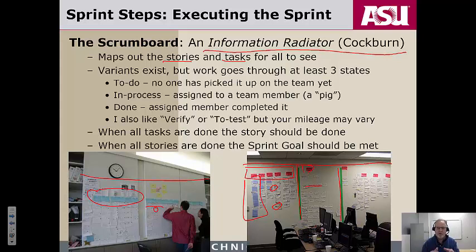The team starts assigning things that they're going to work on. Remember, I talked about for you guys at most two at a time, and in a lot of places like only one. You basically grab a task card, you grab a sticky note, you put it under in progress, and you put your name on it and say, now it's in progress because I'm accepting responsibility for doing this task. All right, and there could be several tasks that are being done according to that one row.